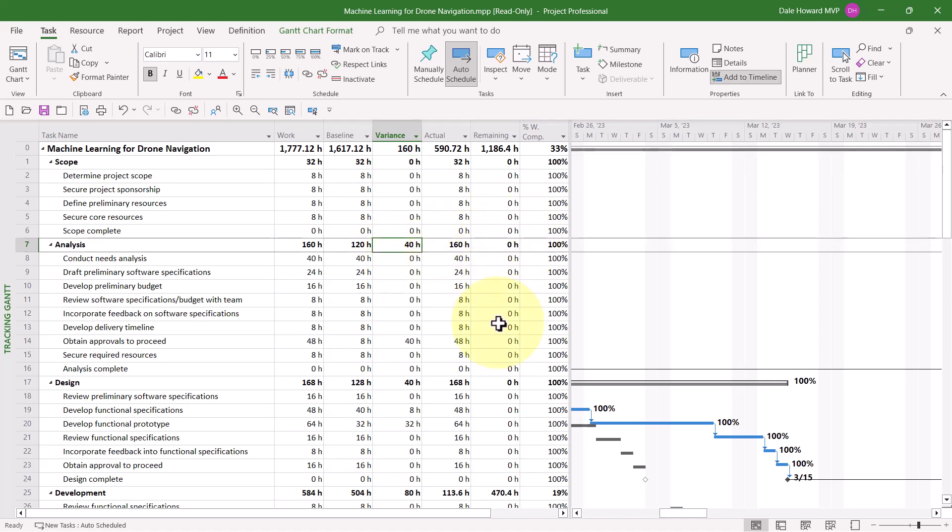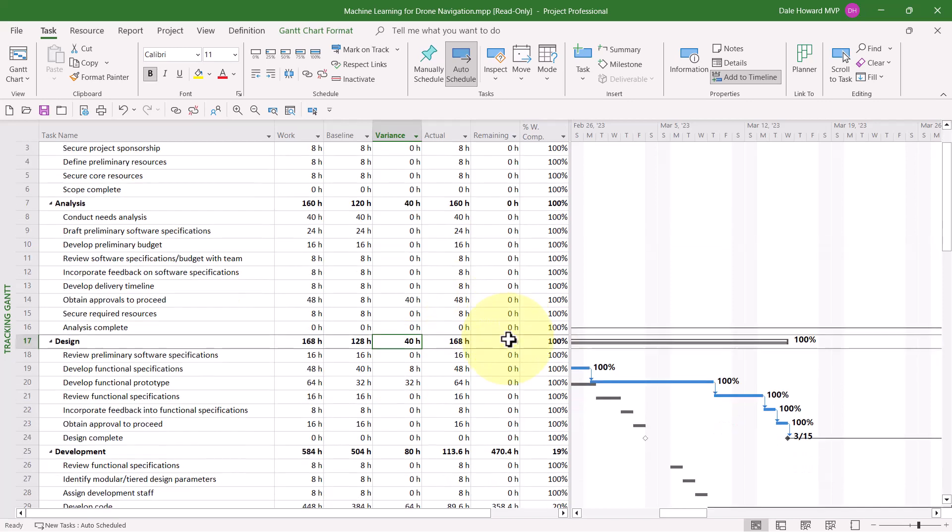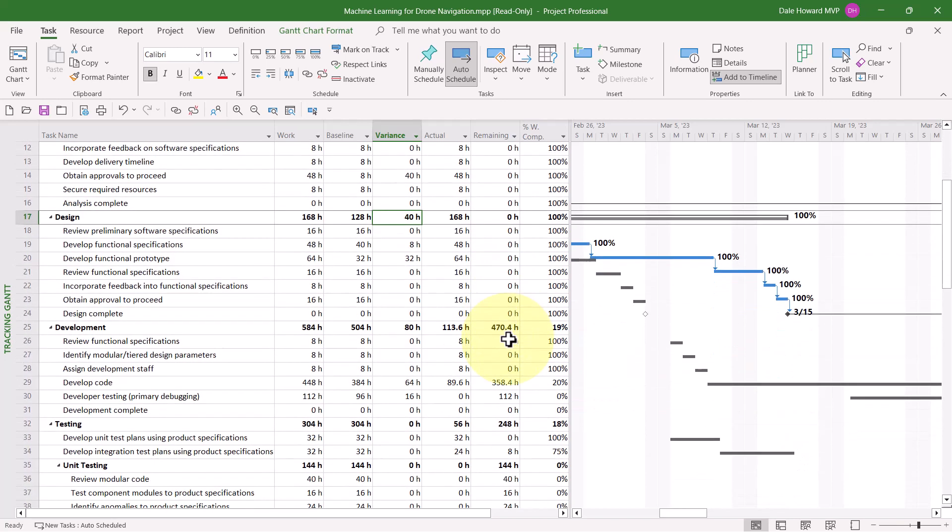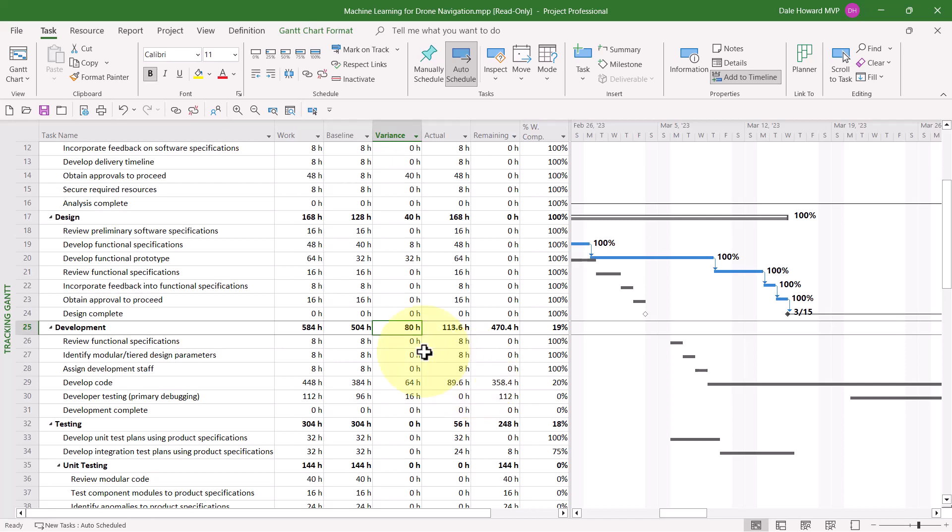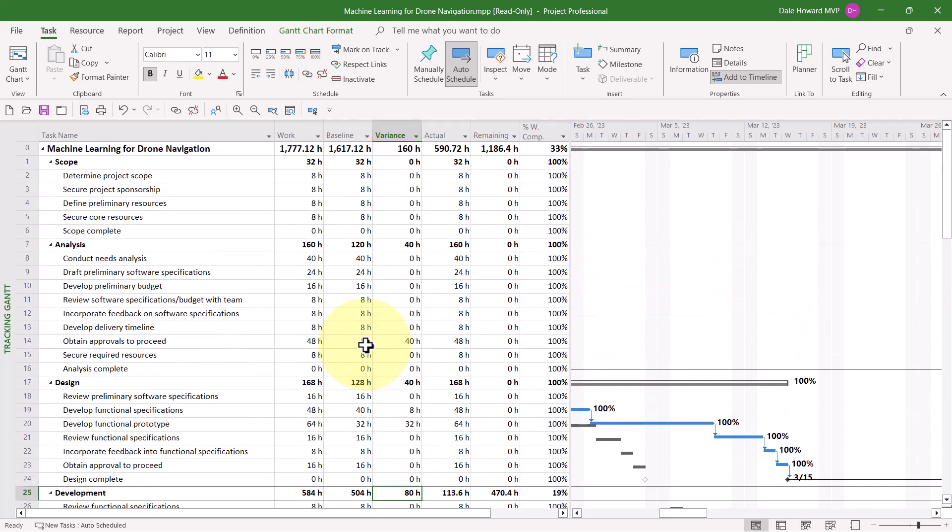The Analysis section went 40 hours over budget. The Design section also went 40 hours over budget. And the Development section is currently 80 hours over budget. Now, you know that if work is going over budget and you're tracking costs, that probably means costs are going over budget as well. So, this leads us to the fourth location where we can analyze variance. It's the Cost Table.